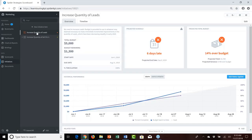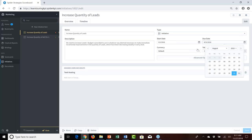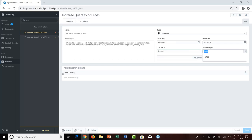After analyzing the data, we decided to create two initiatives: one to increase quantity of leads, and one to increase quantity of ad clicks. The first — increase quantity of leads — was set up with a start date of June 1st 2018, a due date of August 31st 2018, a budget of $5,000, and assigned to Pete Keating.